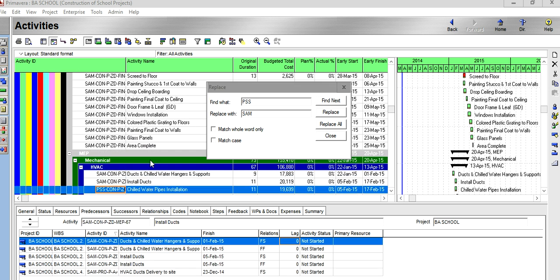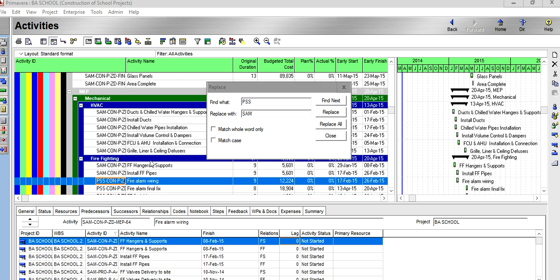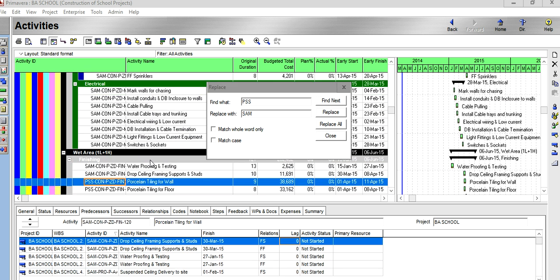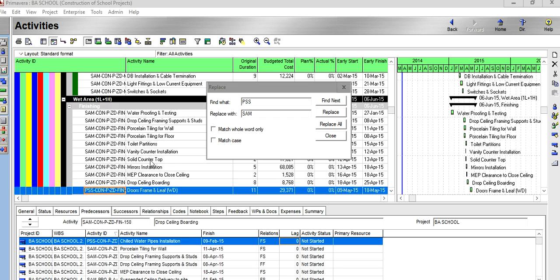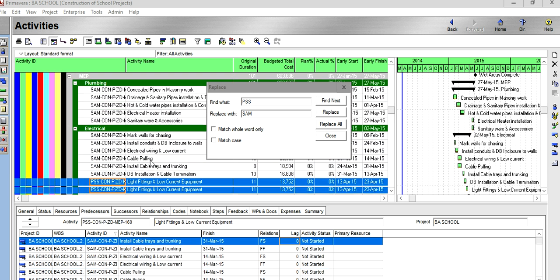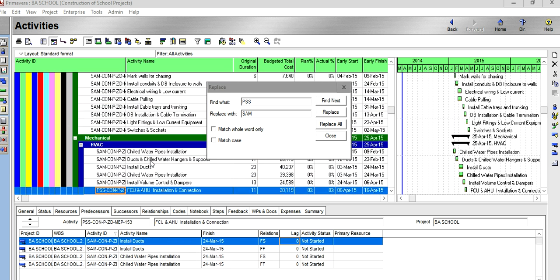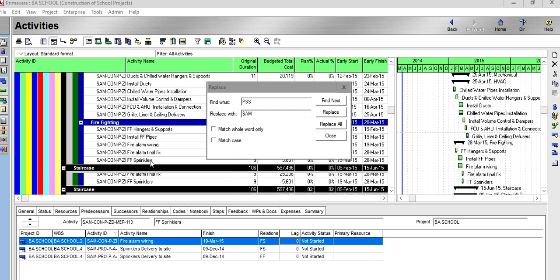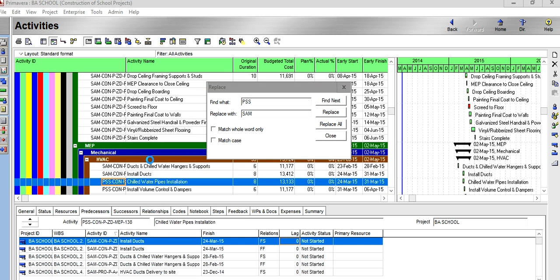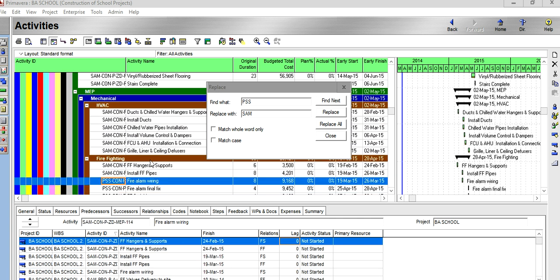So we have a general program for the client, but we have a very detailed internal program for our monitoring and control without affecting the approved baseline. So that's very important. Don't consider that if you have a BOQ and estimate, that's it.